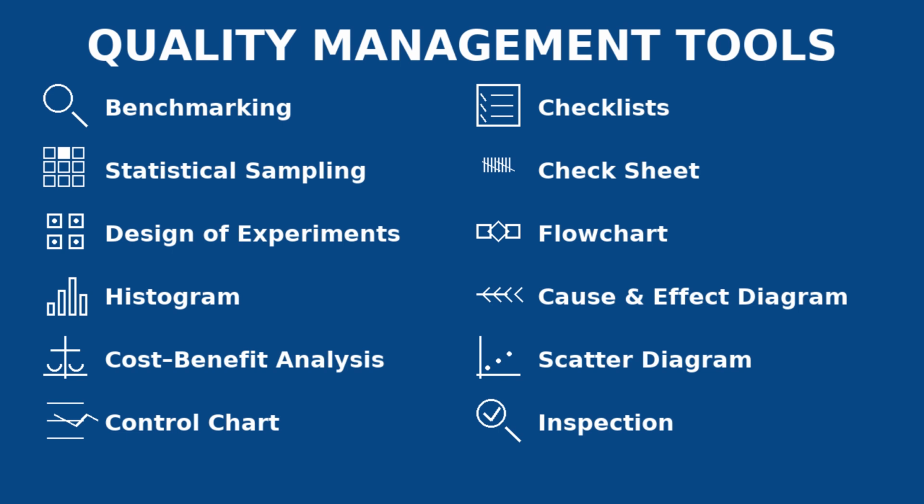There is a last project manager in the room performing an action. Let's find out what action he is performing. He is examining a work product to ensure it meets the standards defined. He is using a tool called inspection. Inspection is all about examining deliverables of a process to verify they meet requirements and to find defects at a very early stage.